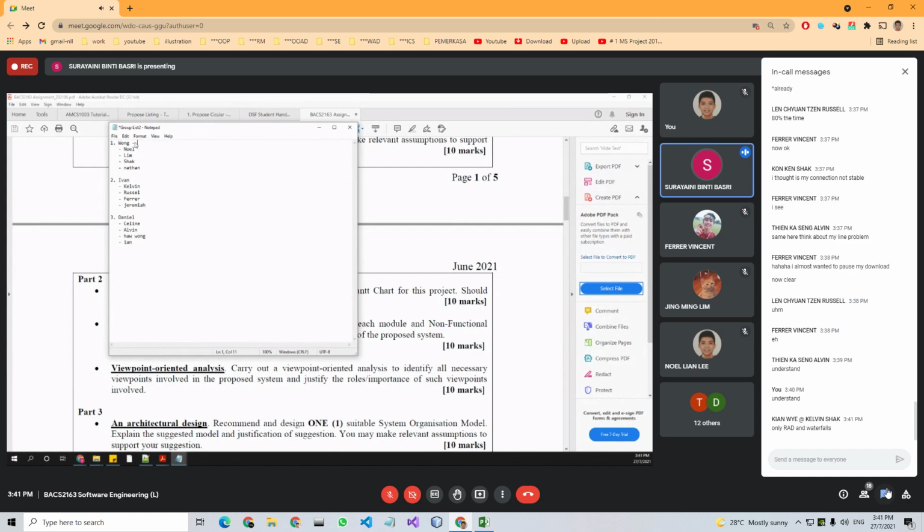In RAD, there is a business modeling phase, and if I am not mistaken there are about 5 or 6 phases or stages. Each module should have the same stages that start at the same time, because it is assuming that each module will have a different team to work.